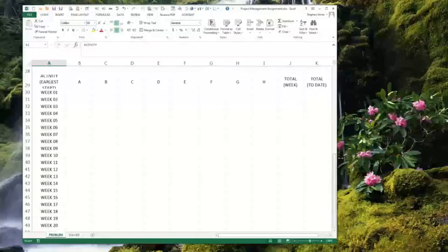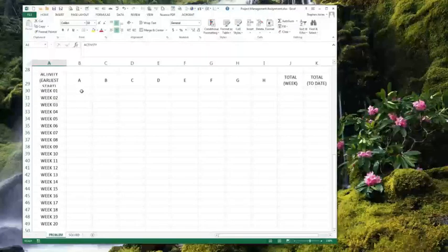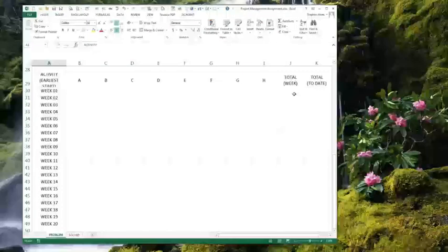And then here you would actually put in the number of weeks for each activity and when you expect that you would actually enter each activity, and you do it by earliest start. You could do it by earliest start, latest finish, earliest finish, whatever, and I've asked you to do it by earliest start. So that's essentially what you're doing. You're coming up with when those are and putting in those costs, and then the total cost per week and the total to date. And this is very much like what you see in your textbook.